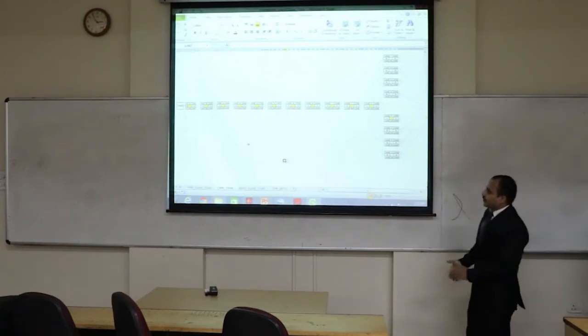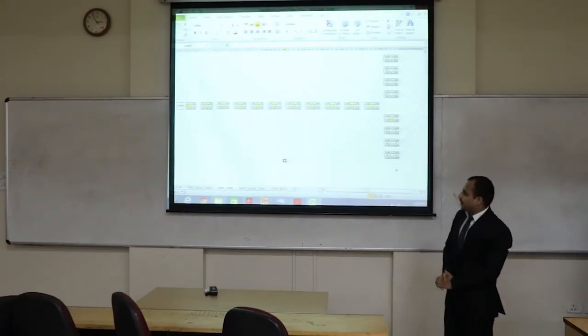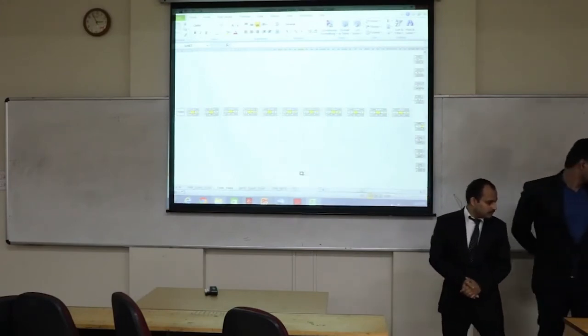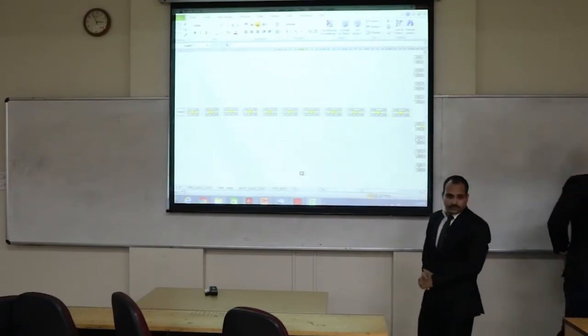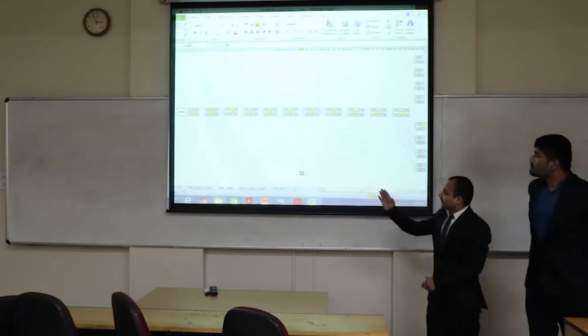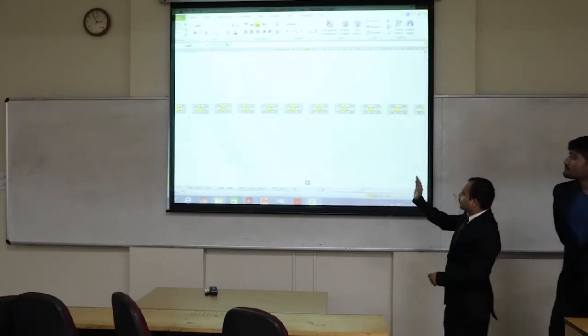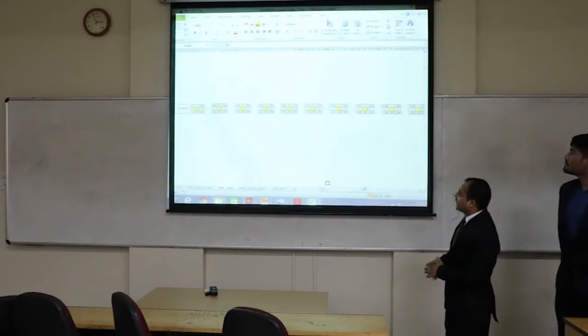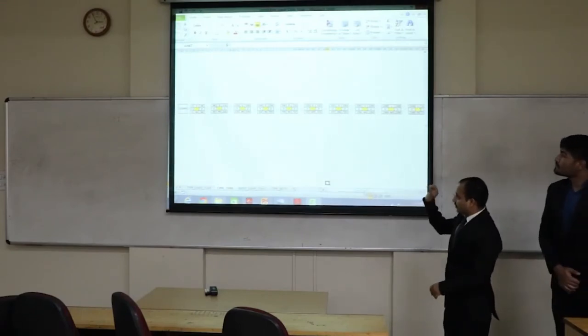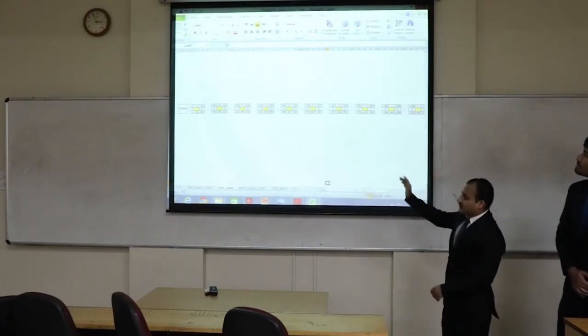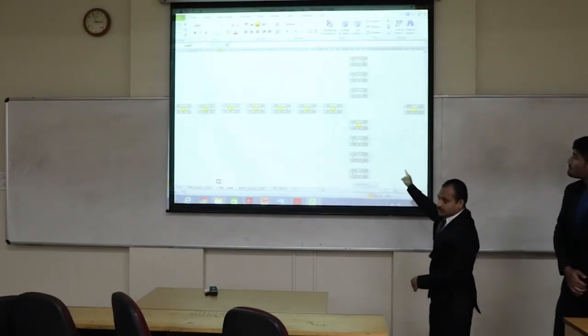We have made this network diagram with all the work breakdown structures. All the activities of work breakdown structures have been converted into different units and then each time is given for each activity and accordingly we found our critical path method as shown by yellow dots.